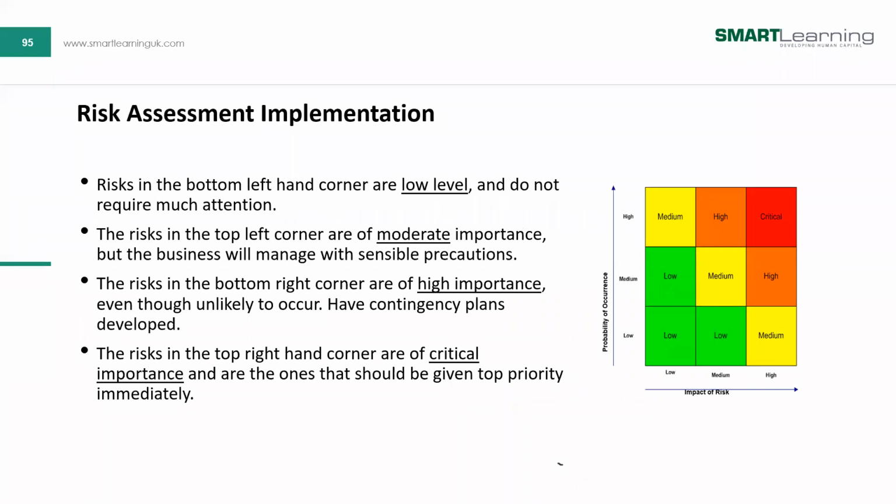Yep, so you can form a risk matrix. If this is looking at it from a qualitative perspective, you can see the risk heat map or the risk matrix. Okay, on one axis, the x-axis, we have the impact. On the y-axis, we have the likelihood, sometimes called the probability of it happening. And it increases from left to right, low, medium, and high, and from bottom to top, low, medium, and high. A combination of low likelihood or low probability and low impact gives us low risk, okay? But high impact and high likelihood, of course, is critical risk.